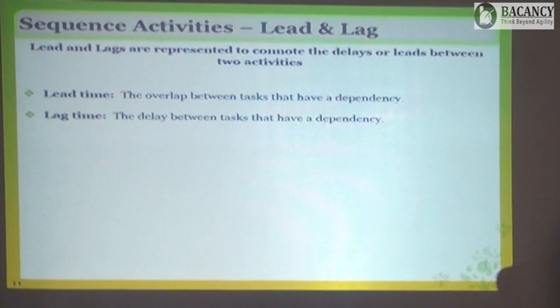We can also have this in finish to finish. We can say FF plus 2 days. So wherever you see the plus sign, it means what? Lag. Absolutely correct. And lead is just the opposite of that.